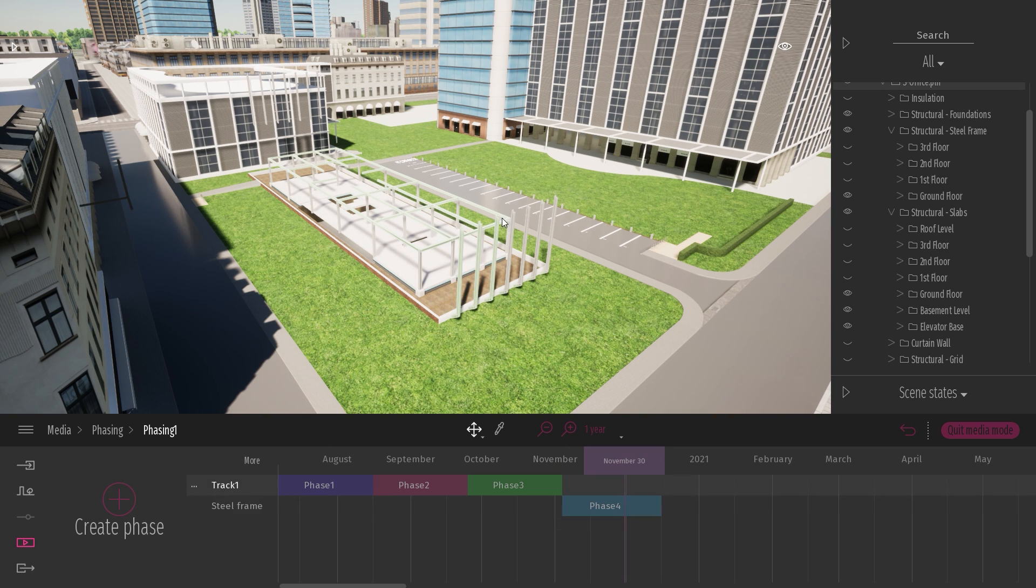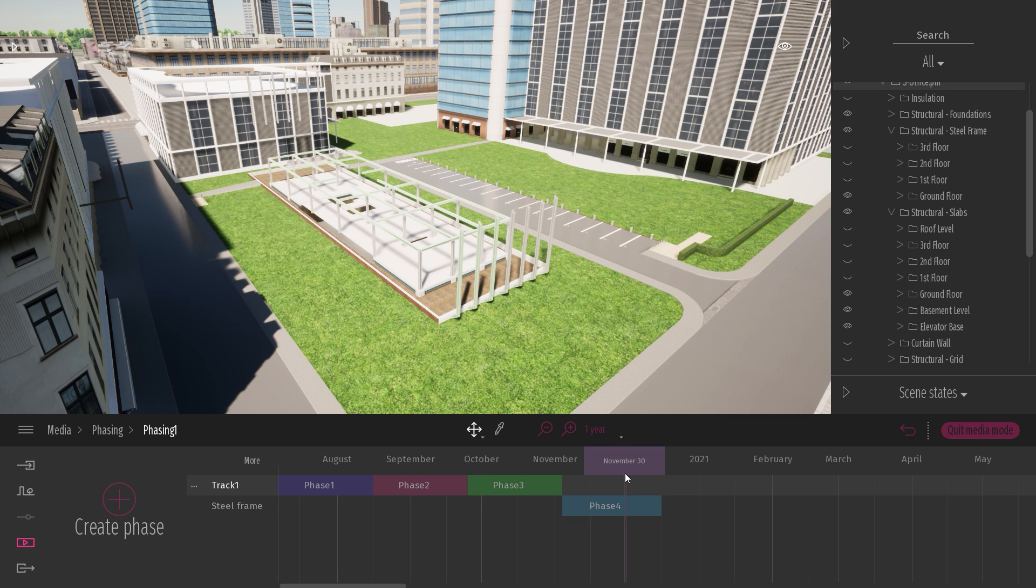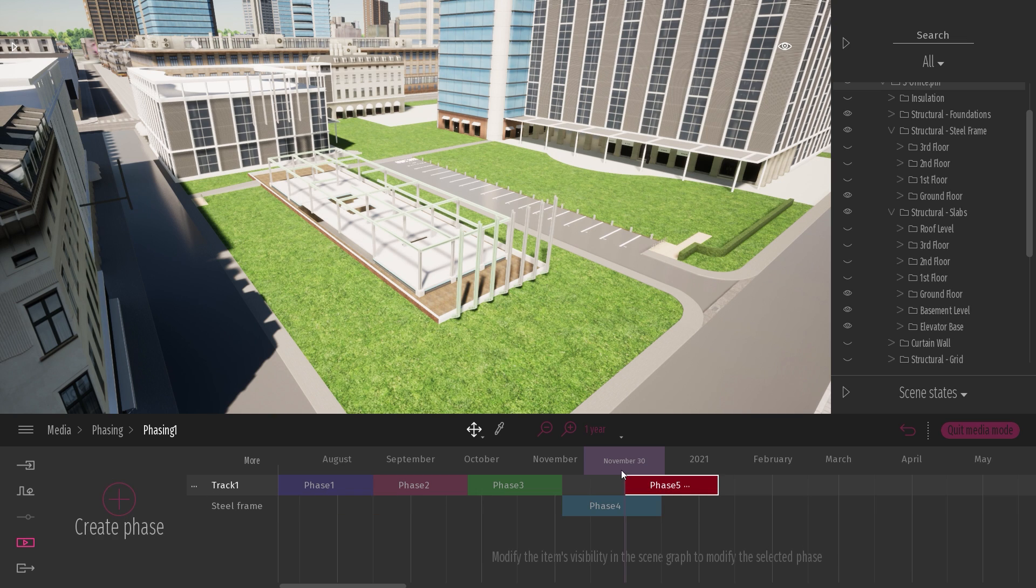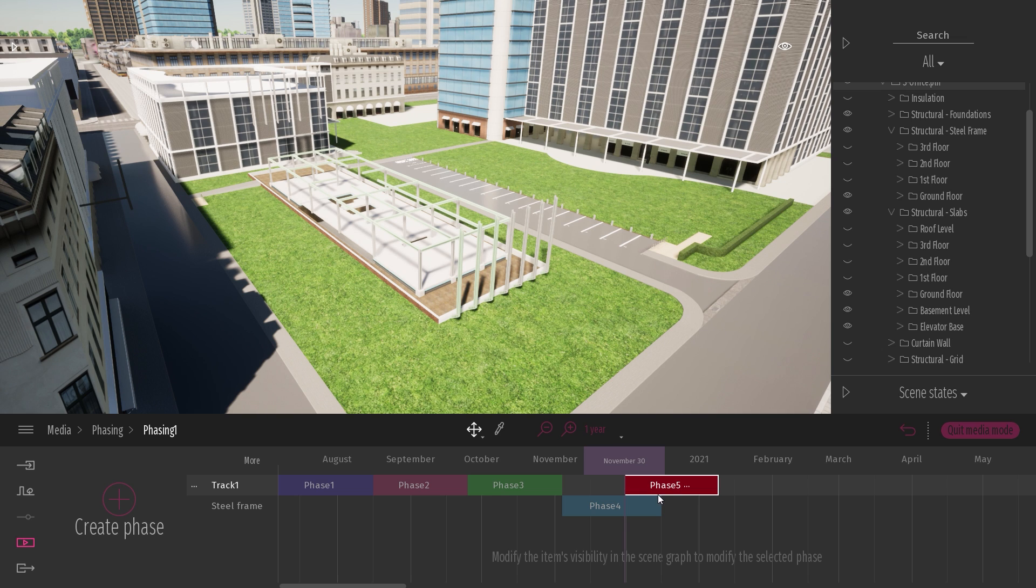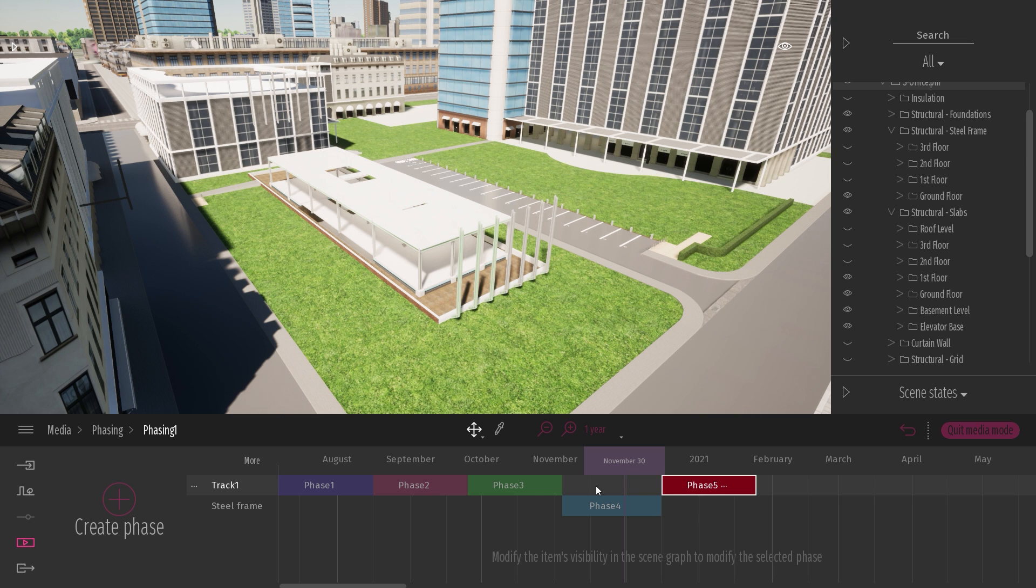Now I want to come back to my first track. And on this track, I want to unhide the slabs of my first floor. So here I selected my track number one. And since there is no visible phase on this track, when I click on the plus button, this will create a new phase exactly at this time, November 30. And now on this phase, I will just unhide my slab of my first row. So let me do that a couple of times.